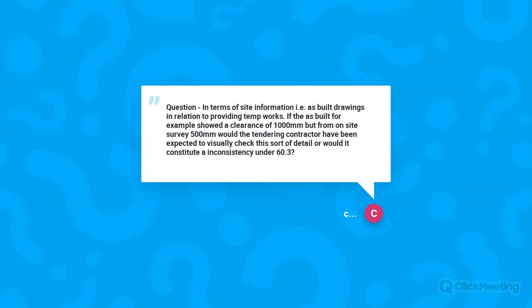First of all, you've got the ambiguity. Secondly, I think you'd argue a visual inspection isn't supposed to be spending 3 days checking that the site information is correct. It's meant to be looking for other things.